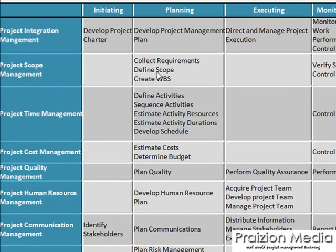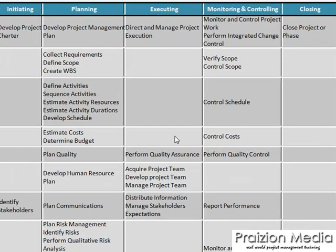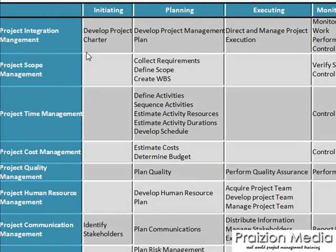The 42 processes of project management as identified in the PMBOK Guide 4th edition. There's often a tendency to think that in project management you initiate the project, after which you plan the project, and in that order you move into executing, monitoring and controlling, and then closing. However, that is a misconception because even though you initiate the project once, you don't end planning at that first iteration. Managing projects is an iterative thing — you keep on planning until you get to the end of the project.